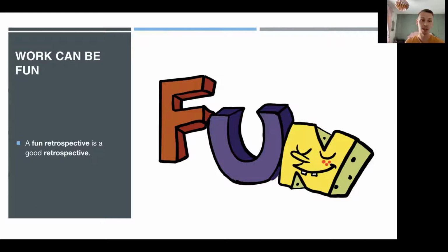storyboard it. So it's always going to have like a setting the scene, breaking the ice. I might use some data, which I probably wouldn't put in a template because it's specific to teams that you work with. And then you can get into the meat and bones of the sessions around some of those prompts. And it's really crucial to end on, or firstly, what you're going to do with those insights. So I use techniques like what, so what, now what. So we generate action owners, but also get that return of time invested from the team and identify who's doing what next. So there's a few different ways that you can make and tailor themed retrospectives.